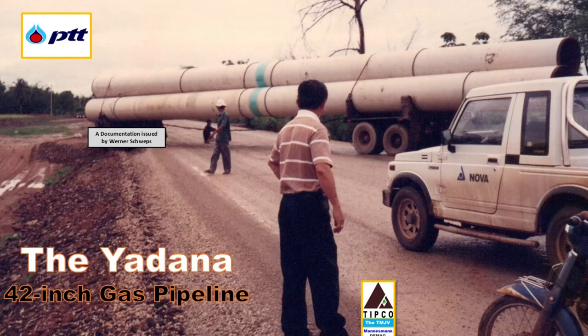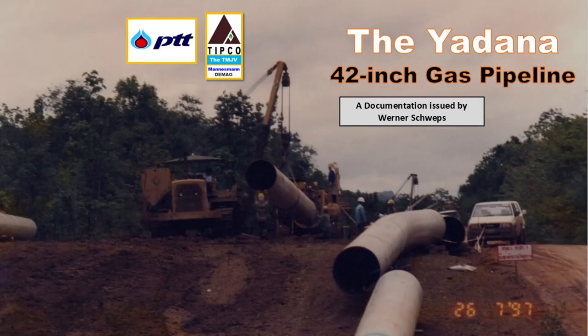The double joint pipe hauling work from our Ratchaburi double joint yard located at Highway 4 went ahead as well here on Road 3209, with the transport of 25-meter-long pipes, and we loaded 3 of those on each truck. Our determination to build a good quality pipeline on time for PTT continued with the normal pipeline activities such as cold field bending, as shown here in the picture.